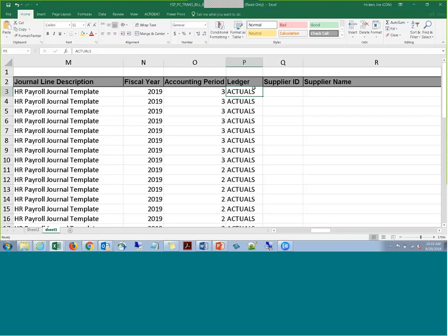So for CAFR Mod and CAFR Full, the folks making those entries, they're not actuals for the purpose of billing, right? These are just for reporting purposes. So unfortunately, this right now is bad data that's going to be coming over into project costing the way the system's currently configured. So any entries that you make to CAFR Mod and CAFR Full using an analysis type of GLE or MND or something like that is going to show up for pricing.